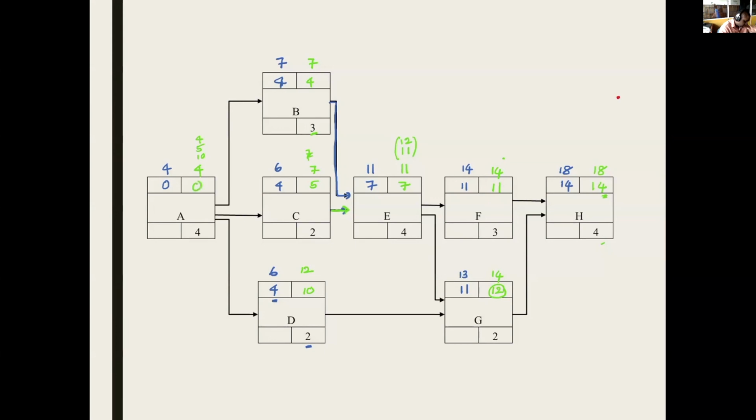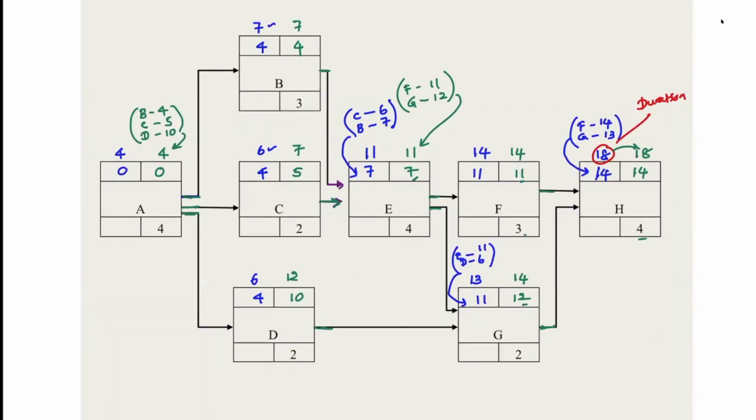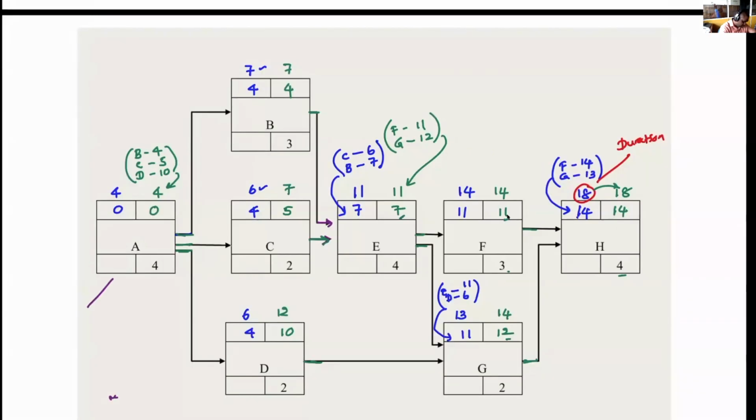4 minus 4 is 0. This 0 is a must. If you have worked out in a correct manner, you definitely have to get that 0. Hopefully there are no issues. Then there's one box that we couldn't fill yet. Float. This box right here.